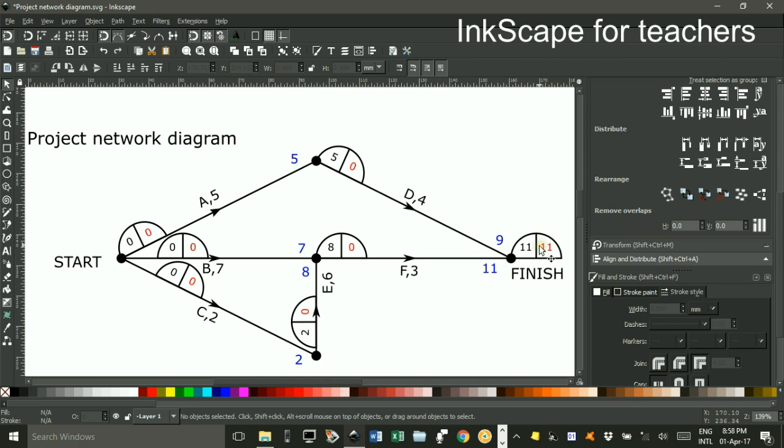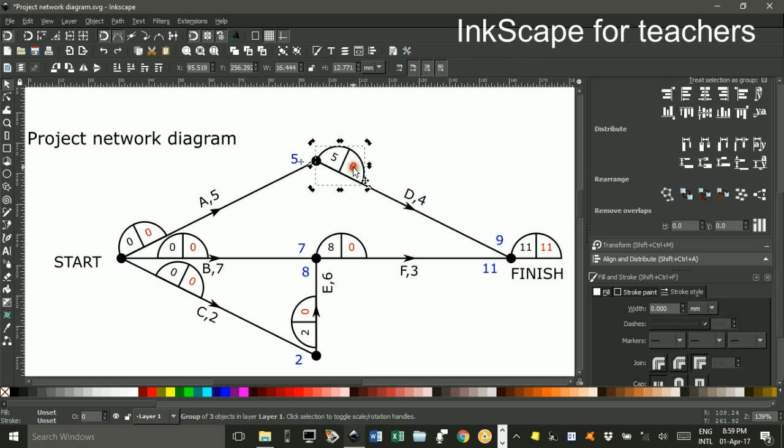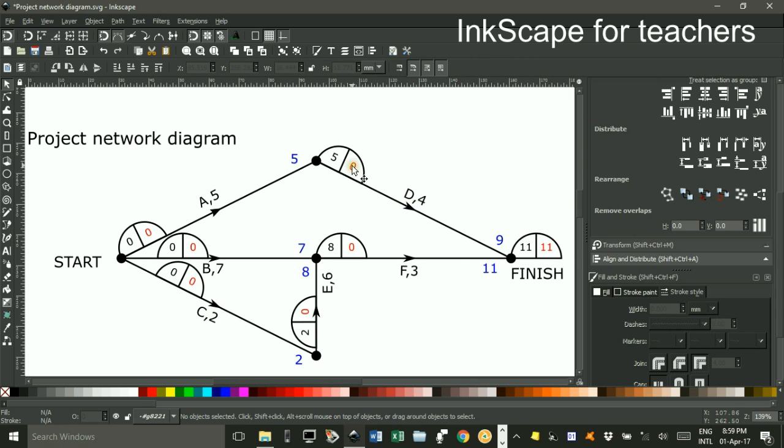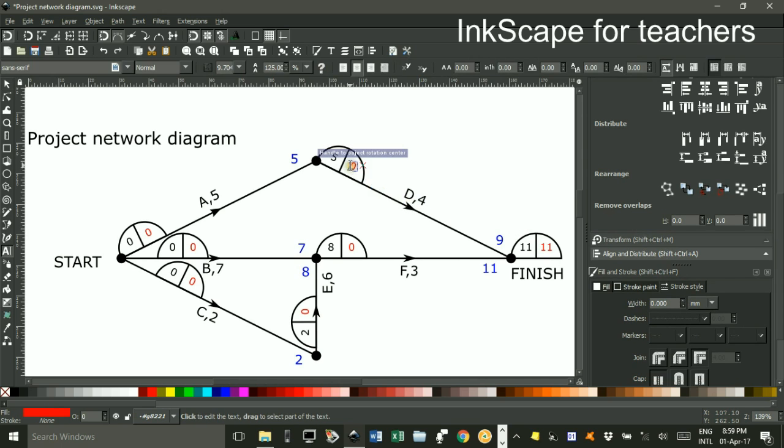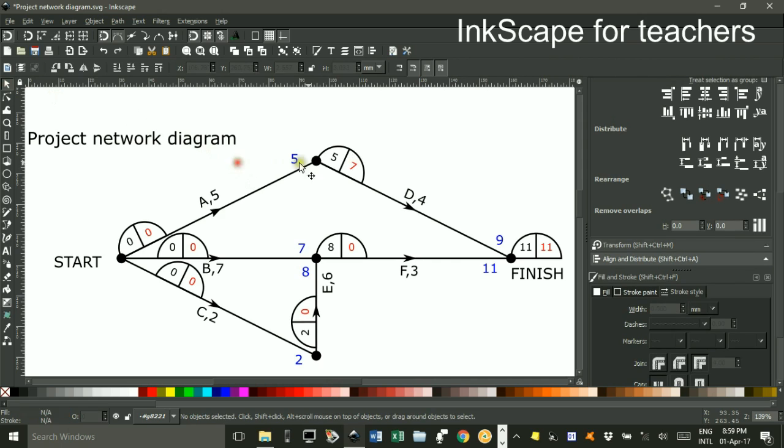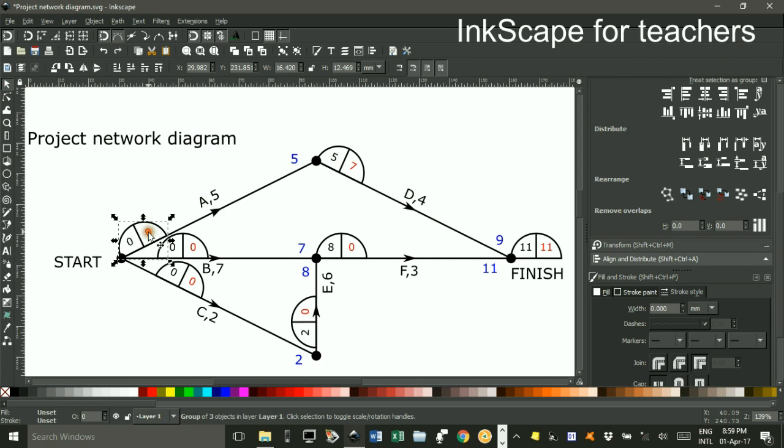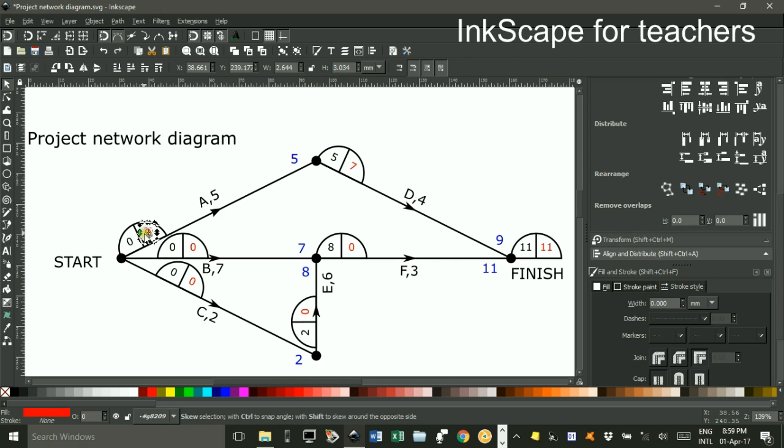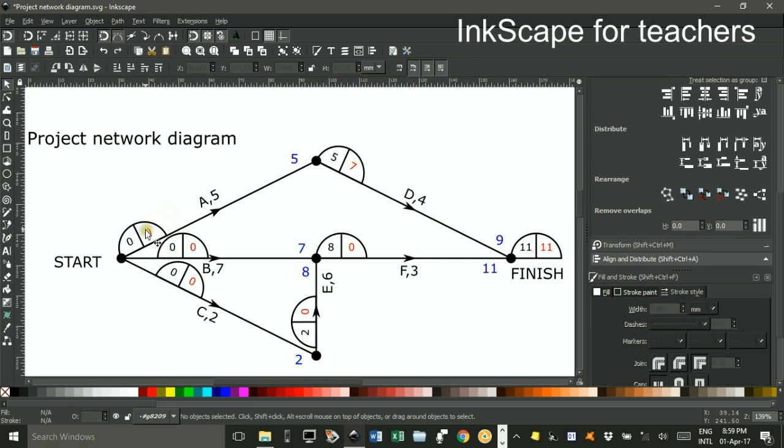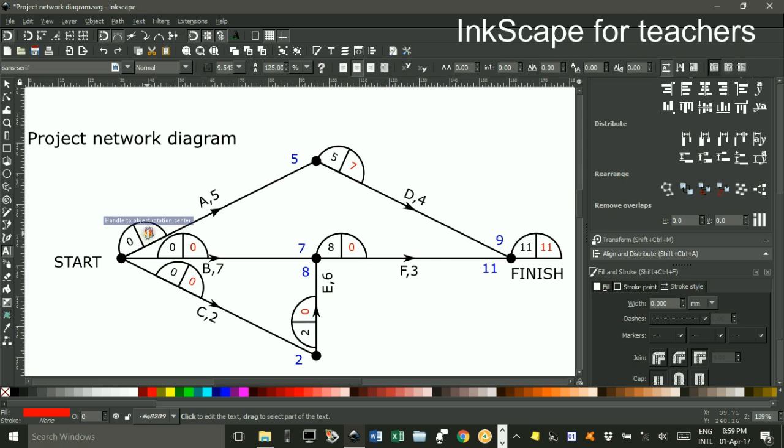Well, we'll go systematically. I know you can probably see it, or many of you will see that, but starting with the red numbers, subtract the durations. So 11 take 4 is 7. Change that to 7. 7 take 5 is 2. So I'll make that 2.